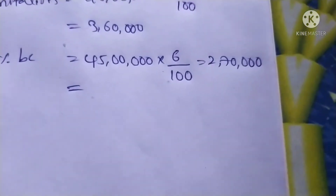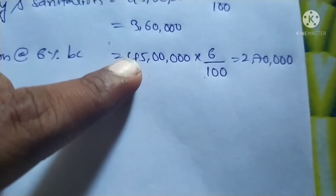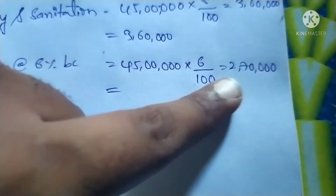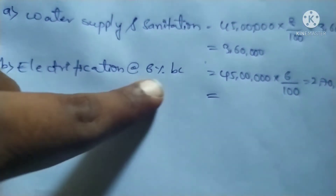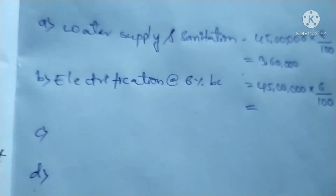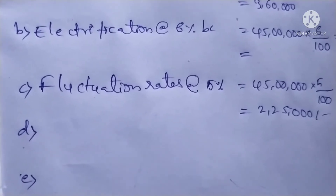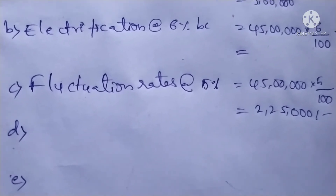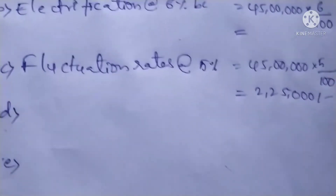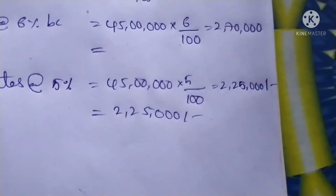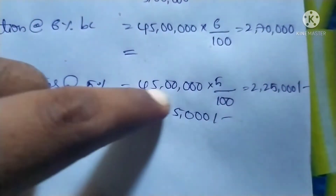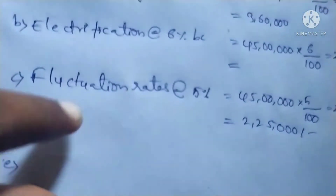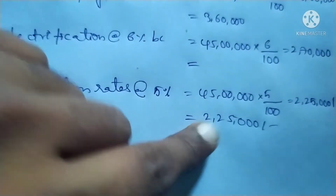Next, fluctuation of rates is 5% of building cost. 45 lakhs into 5 divided by 100 gives 2 lakhs 25 thousand rupees as the cost for fluctuation of rates.